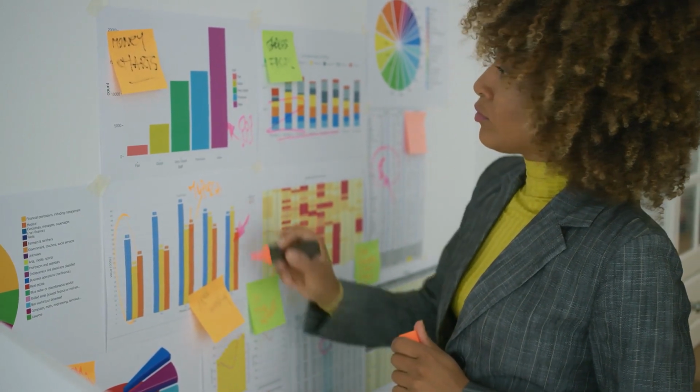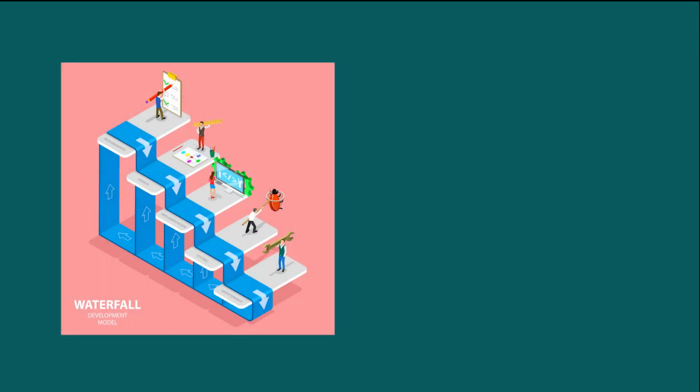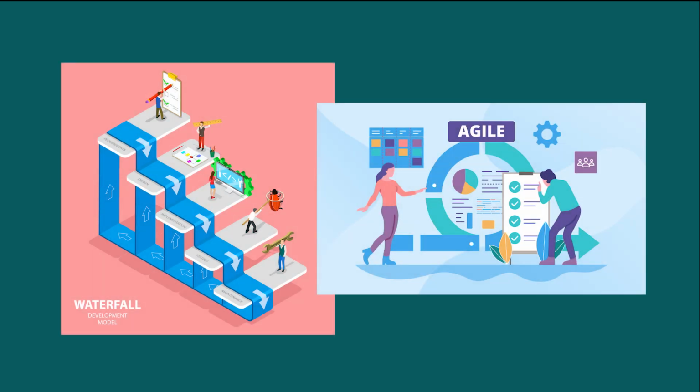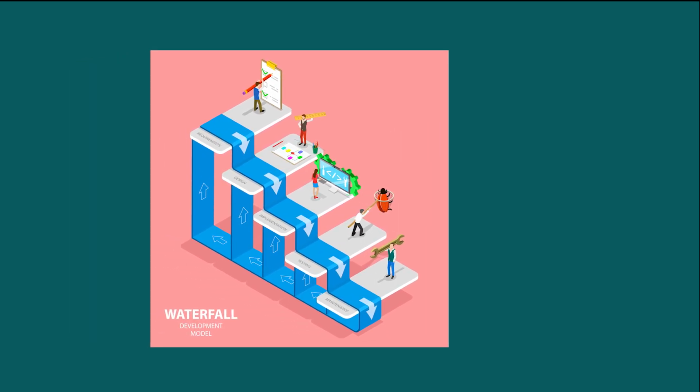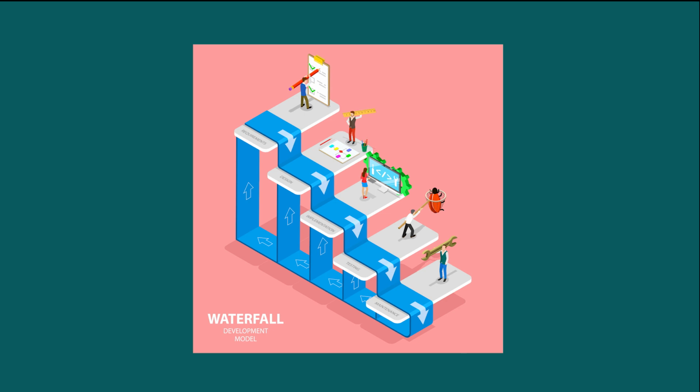Now, the most popular ones really are Waterfall and Agile. You've probably heard of the names before. So Waterfall, now this is the oldest methodology. It has a linear approach, so it's tasks finishing one after the other or starting one after the other. And it has a phased approach, so you have the concept, feasibility, design, development, etc. Now, this focuses a lot on requirements. So it needs upfront planning. It needs to be sure of what the project is delivering.